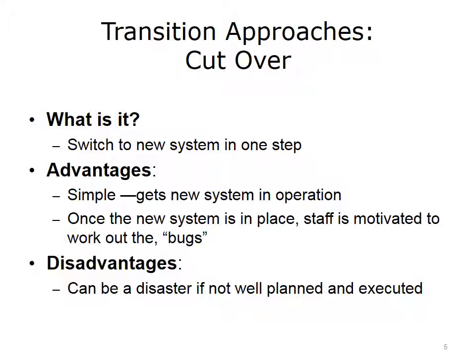There are several different options in terms of transition approaches that we summarize here. One approach is a cutover activity. It is just what the name suggests. You have a date and time when you pull the plug on the old system and switch to the new system. Most knowledge workers are familiar with cutover in simple ways, such as when they upgrade to new versions of software. Cutover has advantages because it is so simple, but as you may expect for custom health IT systems, it is typically only feasible when there has been extensive preparation and the systems in question are low risk and straightforward.